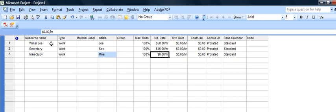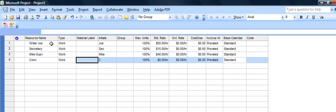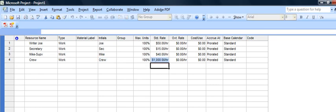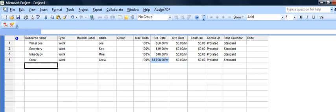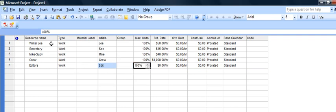We have the crew which the crew is actually going to do the shooting of the film. We'll just call them crew and they're a package deal and maybe we pay a thousand dollars per hour for them. And then we have our editing team, the editors. Let's say we'll just call them edit and give them also a hundred dollars per hour. So let's say that's the resources that we have at our disposal, the people that we'll be able to use.